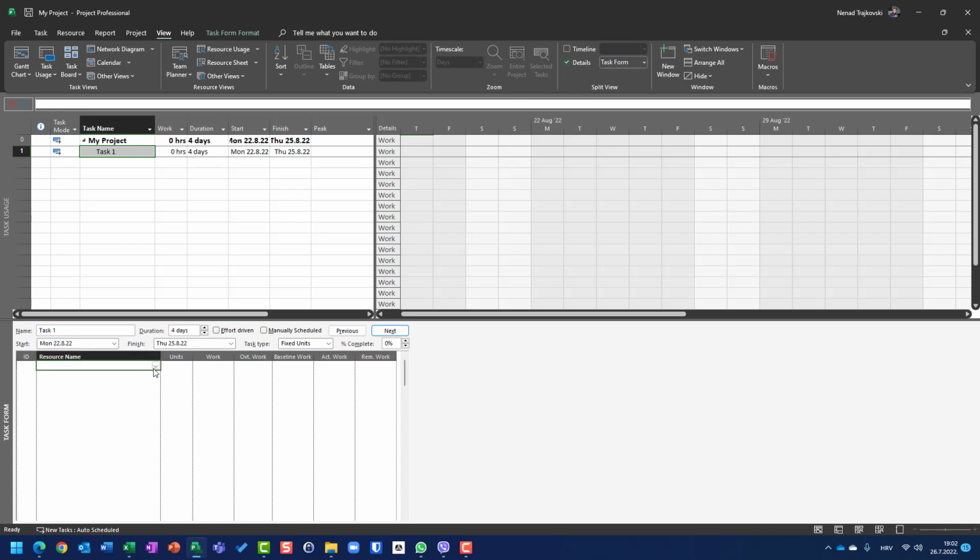So for this particular task, I'm going to assign John and Mary. As expected, and as I explained in one of my previous videos, you can see that they both are going to work 8 hours per day, 4 days, and the total hours are 32. This is a fixed units task, and it is not effort driven.